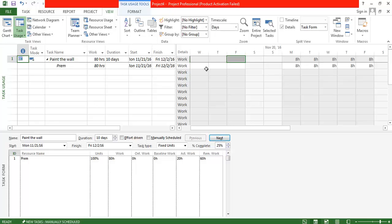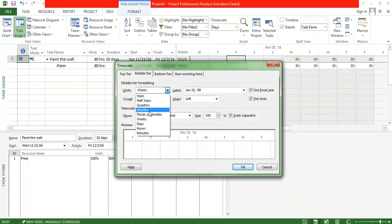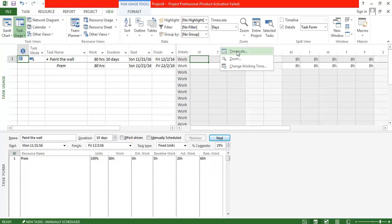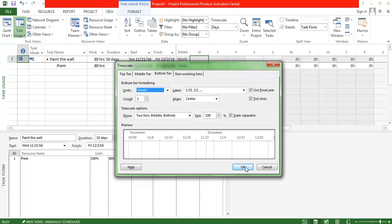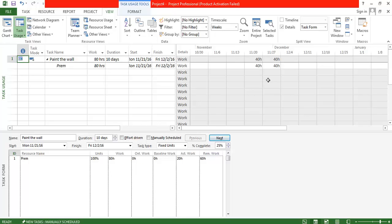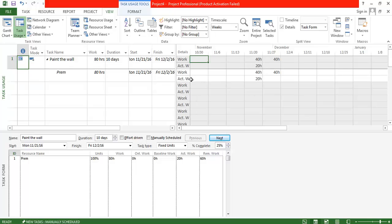Let us view the task usage view in the same format — middle tier as months and bottom tier as weeks. Here you can see there is no difference shown. If I view the actual work, since I assigned 20 hours for this task, it shows 20 hours. It also shows the remaining 20 hours completed in the same week, because the system believes there should be no change in the duration.